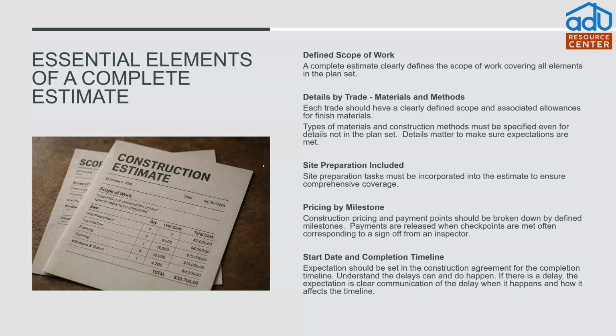Pricing by milestone. This is really important here too. You want to see a clear breakdown of the pricing and at what point the contractor is expecting to be paid for that portion of work. Milestone is much better, in my opinion, simply because it usually corresponds directly to a completion point that is signed off by a city inspector.